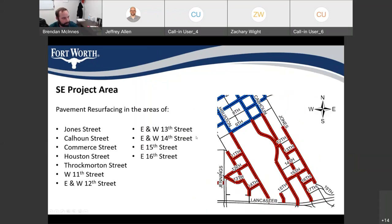The southeast area for resurfacing is going to be Group 2, the second section of paving. That includes Jones Street, Calhoun, Commerce, Houston, Throckmorton, West 11th, East and West 12th Street, East and West 13th Street, East and West 14th Street, East 15th Street, and 16th Street.